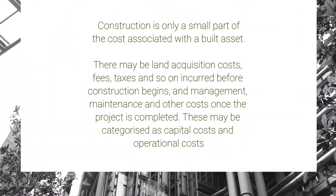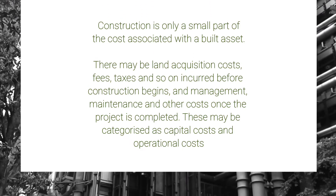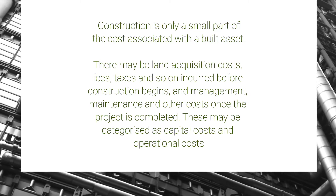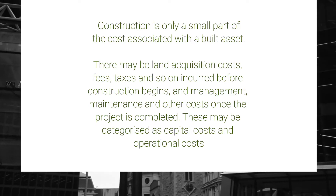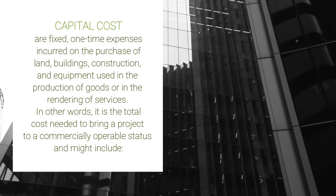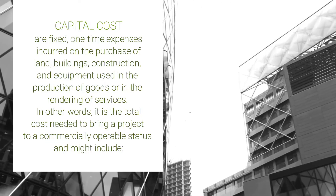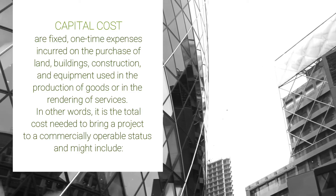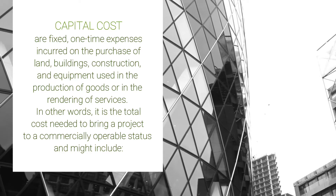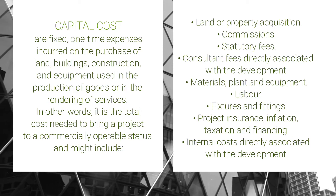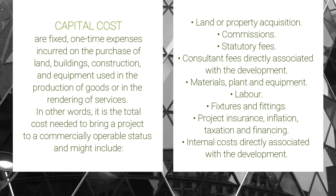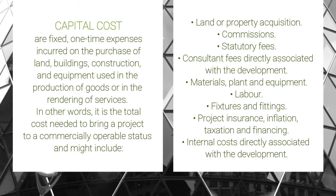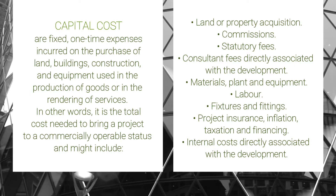Construction is only a small part of the cost associated with a built asset. There may be land acquisition costs, fees, taxes, and so on incurred before construction begins, and management, maintenance, and other costs once the project is completed. This may be categorized as capital cost and operational cost. Capital costs are fixed, one-time expenses incurred on the purchase of land, buildings, construction, and equipment. In other words, it is the total cost needed to bring a project to a commercially operable status, and might include: land or property acquisition, commissions, statutory fees, consultant fees, materials, plant and equipment, labor, fixtures and fittings, project insurance, inflation, taxation, financing, and internal costs directly associated with the development.